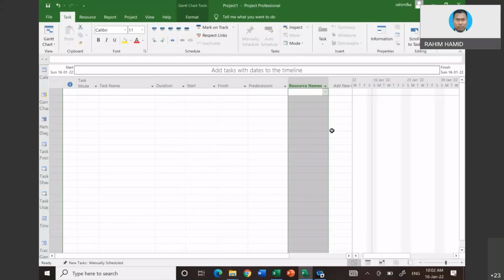Remember, organize means some of the activities will be classified according to the type of work. For instance, in construction, we develop a WBS. The WBS starts from, for instance, site preparation work, which consists of so many activities: site clearing, cut and fill, earthwork, etc., including demolition work.